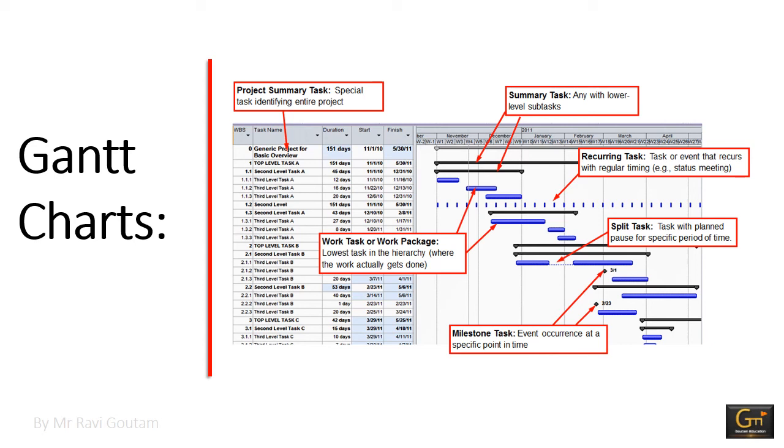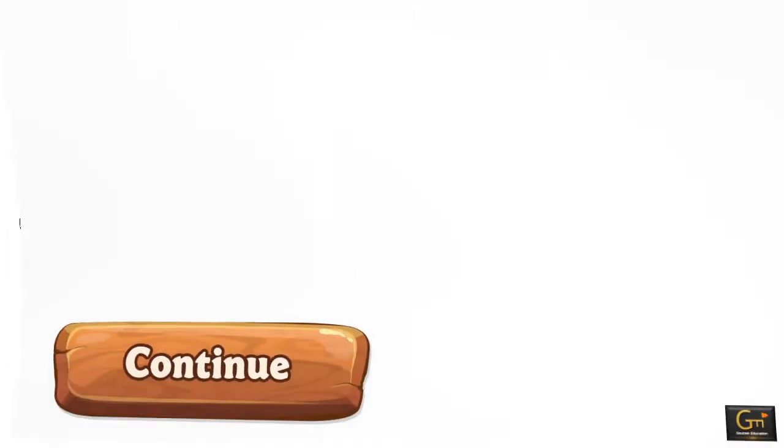Each of these phases must be broken into the next level of detail, and each of those into a still finer level of detail until a manageable task size is arrived at. The first work breakdown structure level for the life cycle would be project initiation, draft project plan, analysis phase, plan user interviews, schedule user interviews, examination and test, design, test and implementation.